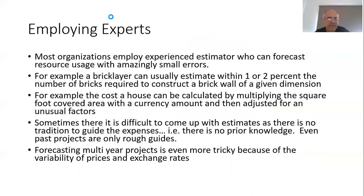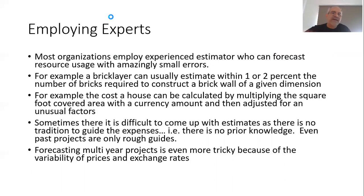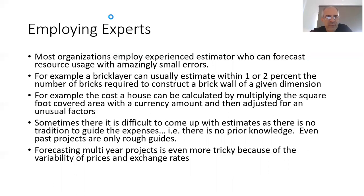Now, who should be used to make this budget? We're not going to rely on people with no knowledge of the nature of the work. We're going to rely on experts — the people who actually perform the work. These are the people who will give us an idea of how many man-hours they'll require, how much machinery is needed, or how much material is required. We ask these experts to help us forecast and come up with estimates of the resources we need to use.